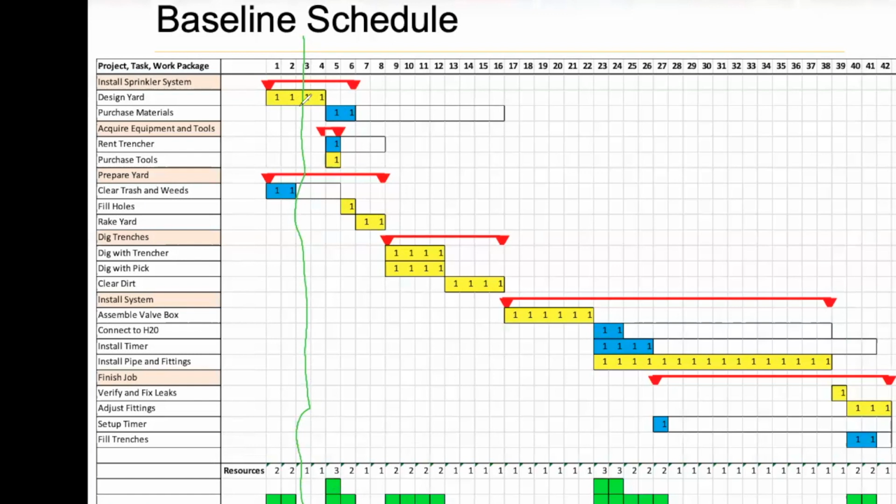Basically one cube, one square, is 1 hour of labor. So when I take a snapshot for the 3rd hour of my project, I just brought everything down as 1 square, because there's only one here. I just collapsed that one down. Do you understand what I mean?